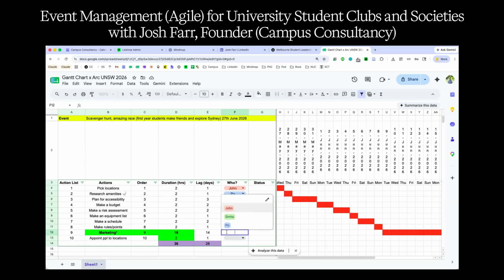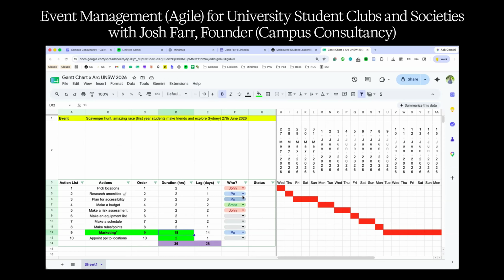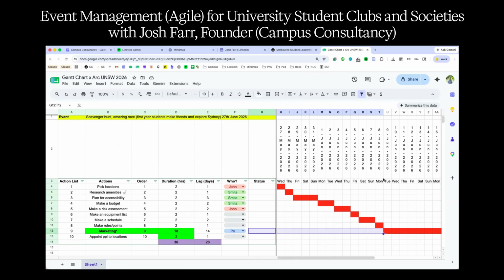Now you might say, that's a lot. For Poe to do 14 hours or 18 hours of marketing, that's a lot. It is, but what you'll notice is Poe, if Poe's doing that, for example, might not have anything to do until the 9th of June. What we don't want Poe to do is spend the next 13 days doing nothing. Instead, we want Poe doing all the thinking and all the planning so that when the marketing's ready, it can go live.